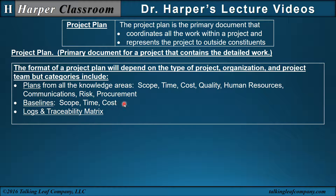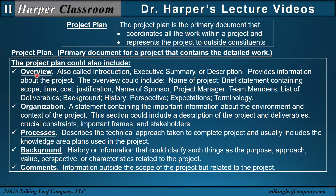The project plan also includes baselines — scope, time, and cost — which can change as it goes through integrated change control. Logs are documented communications, and traceability matrices identify progress, risks, and responses. The project plan could additionally include an overview (also called introduction, executive summary, or description), organization (important information about environment and context such as crucial constraints, political and social frames, and key stakeholders), processes (the technical approach taken to complete the project), background (history important to the project), and comments (information outside scope but related to the project).